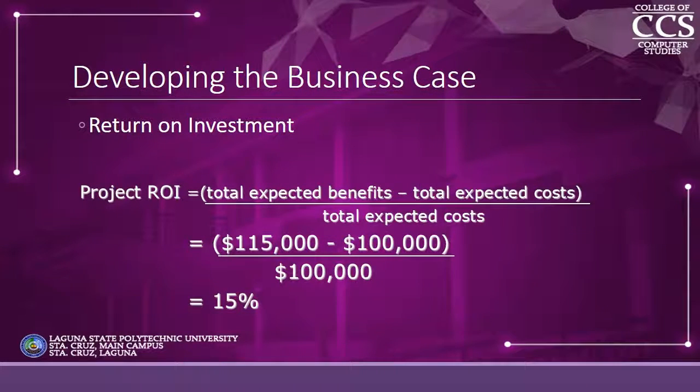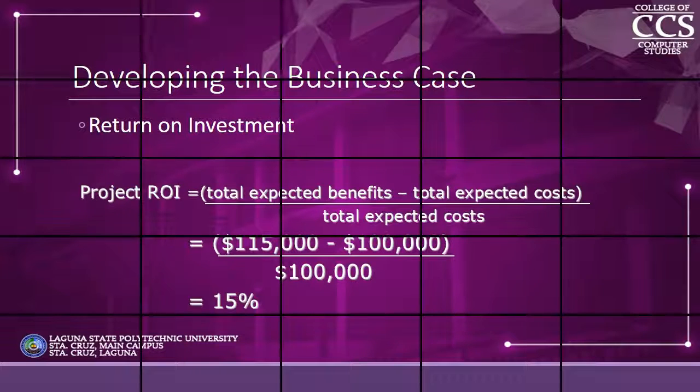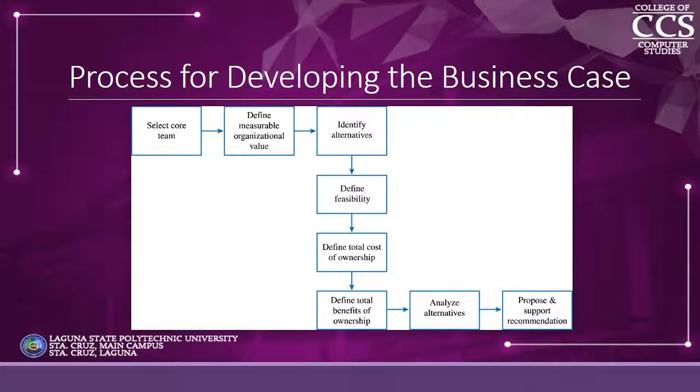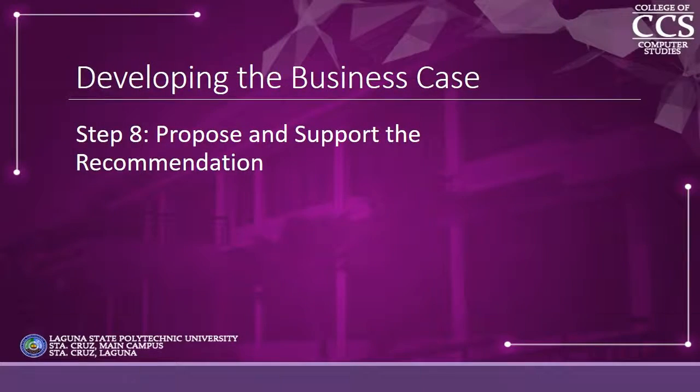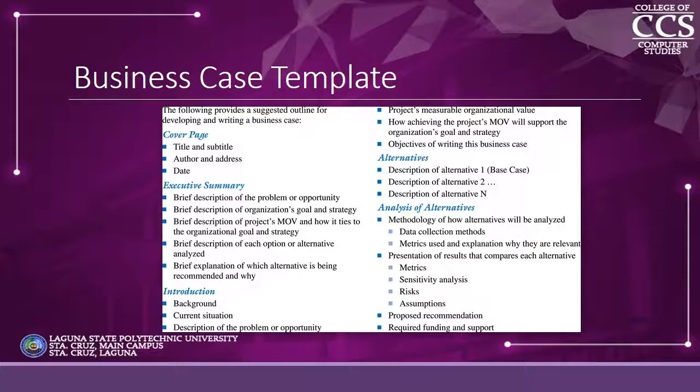Return on investment. The return on investment or ROI must be equivalent to total expected benefits minus total expected cost over total expected costs. Step 8 in developing the business case. Propose and support the recommendation. Here is a business case template example.